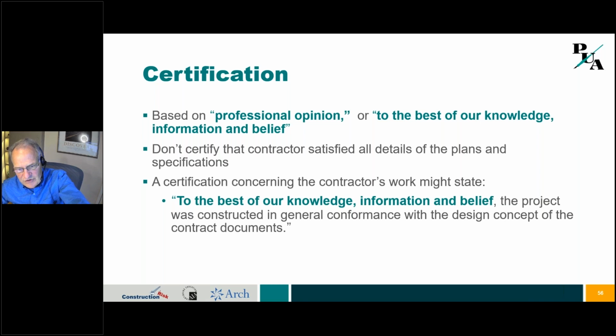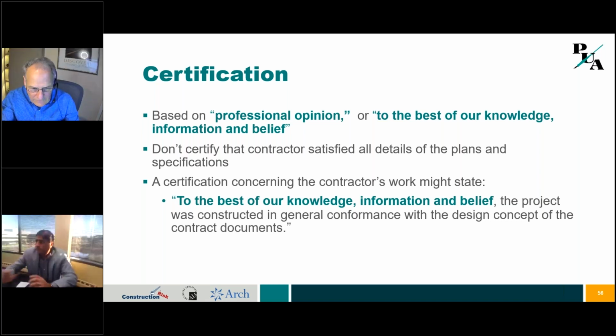Based on your professional opinion or to the best of your knowledge, information, and belief, the contractor met the requirements of the plans and specs. That's all you can say. That's not a warranty. You're just saying, look, based on what I could tell, they did. It gives you that wiggle room, if you will. To the best of our knowledge, information, belief, the project was constructed in general conformance with the design concept. Not bad. Okay, next slide.